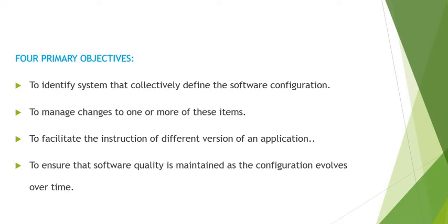Changes to baselines are controlled according to a documented procedure. Products from the software baseline library are created and their release is controlled according to a documented procedure. The status of configuration items or units is recorded according to a documented procedure.